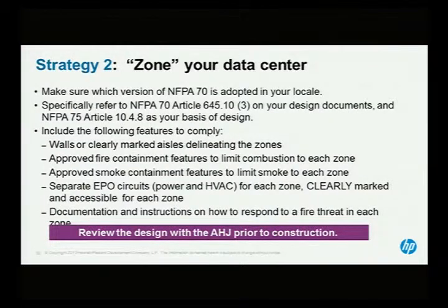Here's a key. Not all jurisdictions follow the same code, all right? Codes are issued every 3 years. We're currently operating under the 2011 code. The 2014 is due out shortly. I'm licensed in the state of Connecticut. The state of Connecticut still operates under the 2008 codes. They take a long time to adopt the codes. So you have to make sure which code version you're under. But you make sure it's followed.